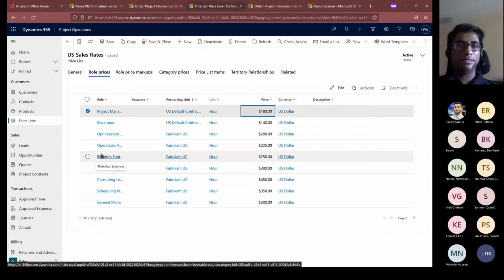And when they have to do the time entries, they can just select "pull all my allocations from the schedule board," or "let me manually do it myself," right? They recommend pulling it all from the schedule board, so that there's no mistake, and there's no conflict between what was scheduled versus what the resource has billed. So that's one aspect of it.